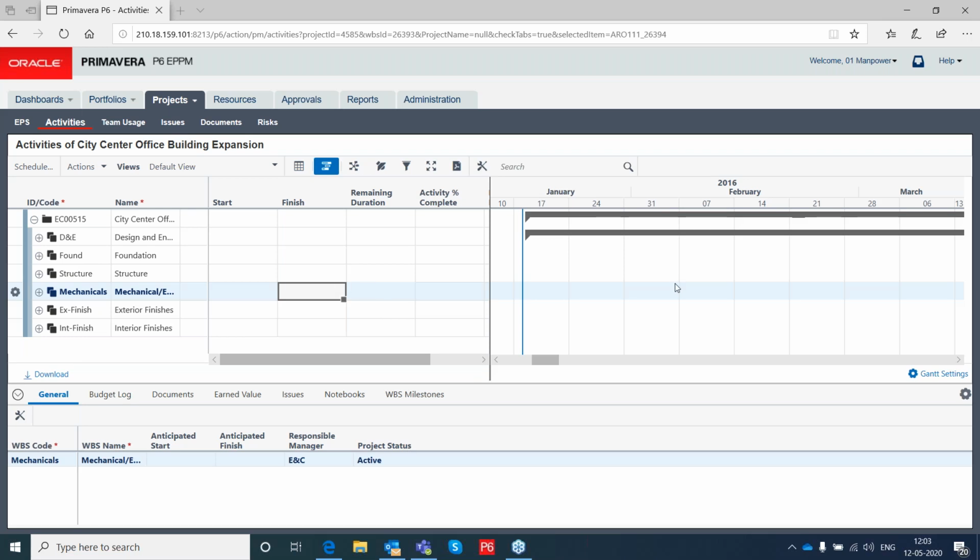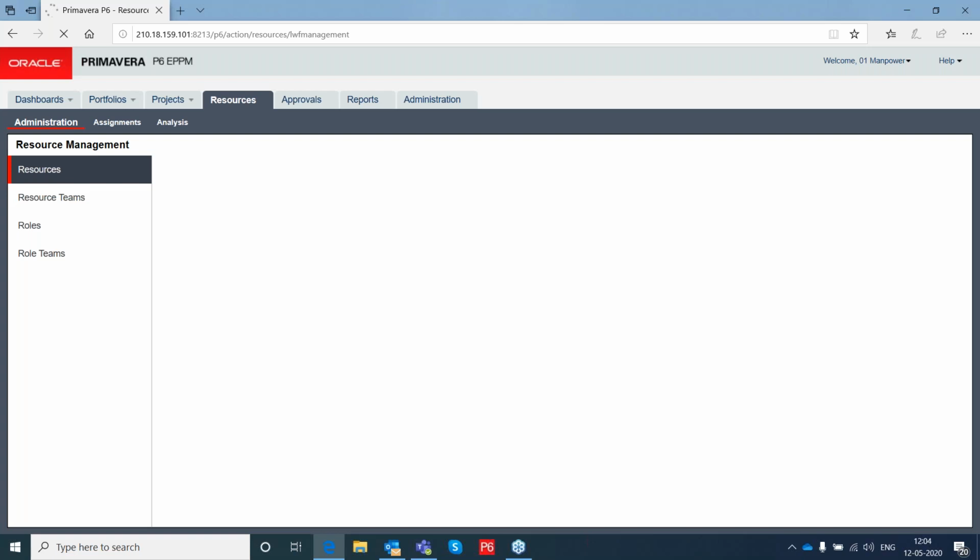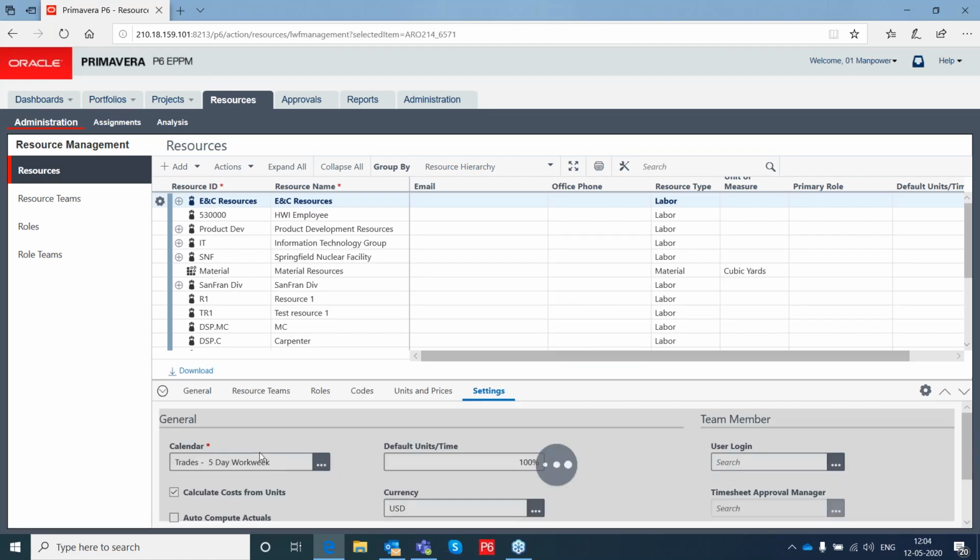One is the cost, another is the cash. If you want to manage both cost and cash management, then it needs to be done using Primavera Unifier. EPPM takes one area. We don't get into the cash management in EPPM. EPPM is mostly the cost management.